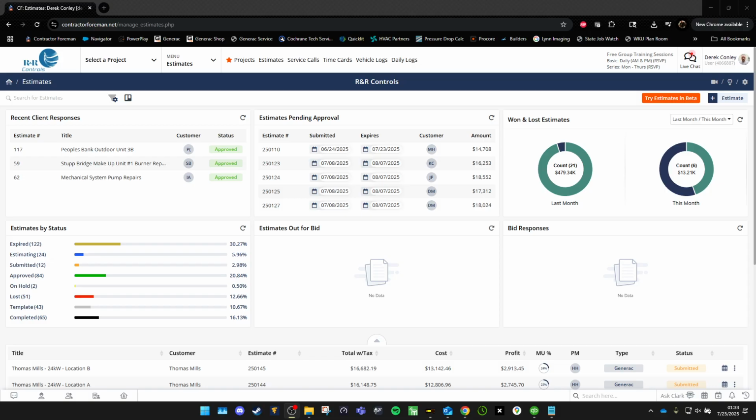The last thing, if they can't order the work currently, it gives them a number to try and work into their next fiscal year's budget. We've had to do that numerous times where, hey, we want to get this done. We cannot do it until next fiscal year. Give us a number so we can try to secure that number within our budget so we can get this to work.